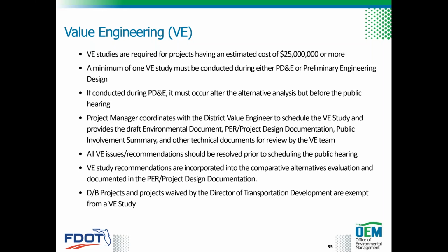The project manager then is in charge of coordinating and scheduling the value engineering study with the district value engineer, and making sure that the draft environmental document, the PER, and summary of public involvement and other technical documents are available for review by the value engineering team. Any recommendations from the value engineering study must be incorporated in the comparative analysis evaluation and documented in the PER and environmental document.